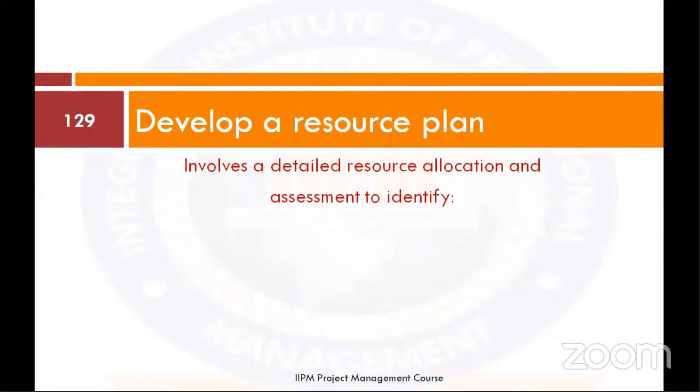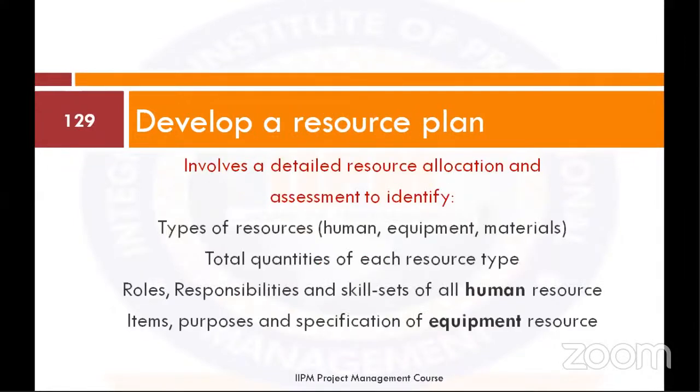Now, from there, you establish your resource plan. From the list of activities or the phases of work that you have to do, you can ask, okay, we need so-so person, we need so-so person. This still reflects back on your organizational structure that you established during your initiation phase.